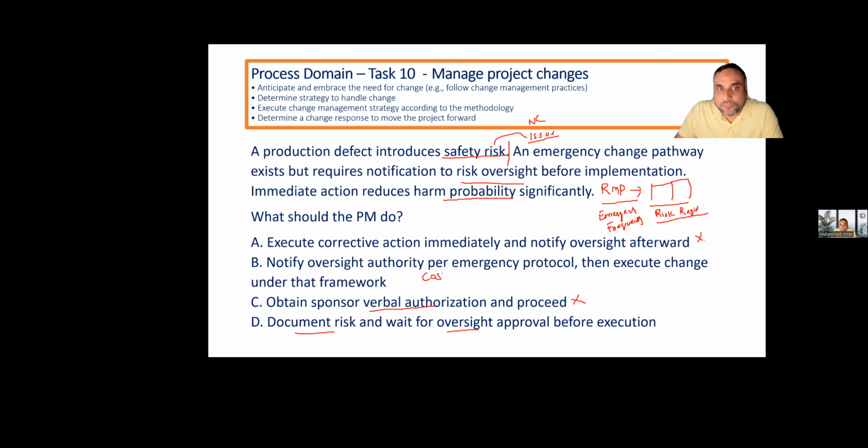So one of you is asking: cost of quality equals cost of conformance plus cost of non-conformance. The audit we do as a preventive measure is our cost of conformance.